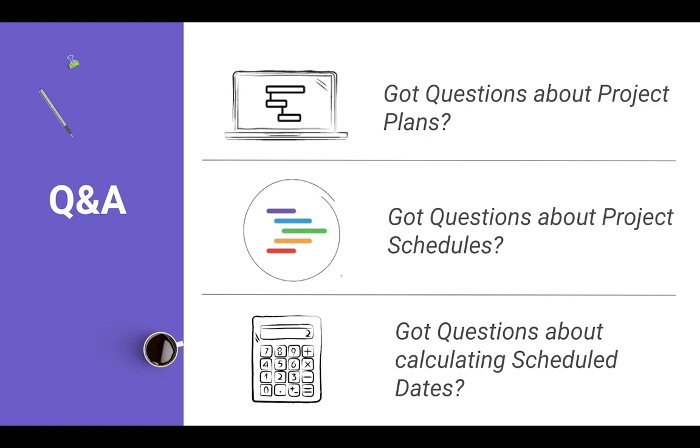So, for example, on a fixed schedule project, you actually cannot create those user estimated dates on the task modal. There's no editing there. There's no creating of dates. So it definitely differs. And if you change dates in the plan on that Gantt chart screen, no matter what type of schedule your project has, those plan dates will change, and they potentially have an impact on other dates, on the scheduled dates, for example.